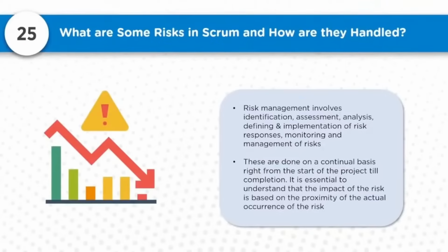So depending on the impact and probability of a risk, if it is a high impact risk, obviously you are required to do both qualitative and quantitative analysis. If it is a simple one with very little impact, you can take the call accordingly on to what extent you may require to analyze and have response plans for it. Once you have defined and implemented the response plans, quite obviously you should keep monitoring and managing the risks. Now, risk impacts and probabilities may vary as the project progresses.